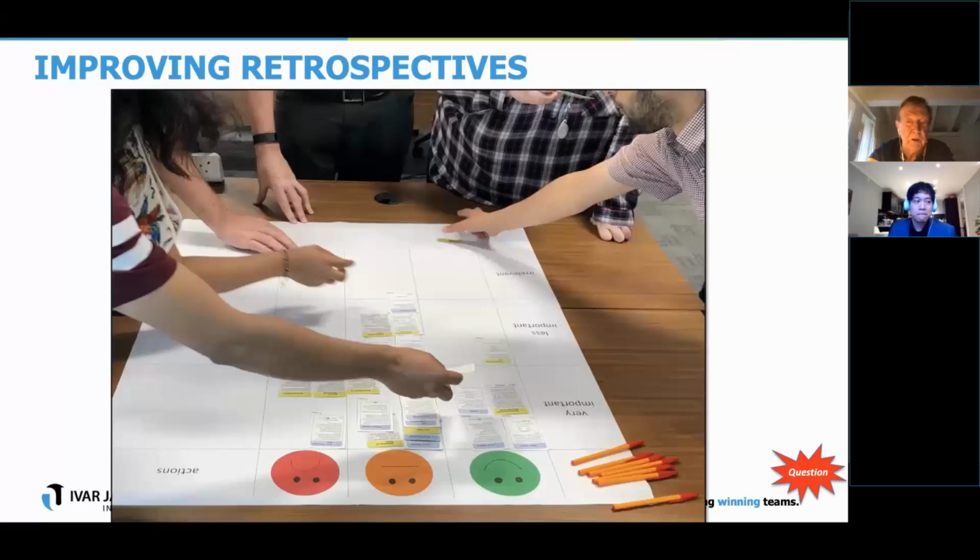So then you take the cards in the Scrum deck, and put them in the right box. There are very important things we are doing very well. There are very important things that we do very badly. There is one card there, or maybe there are two or three cards there, and so on. And then the team discusses what actions should we do, and they go ahead with these actions. Yes, so you make a list of actions.